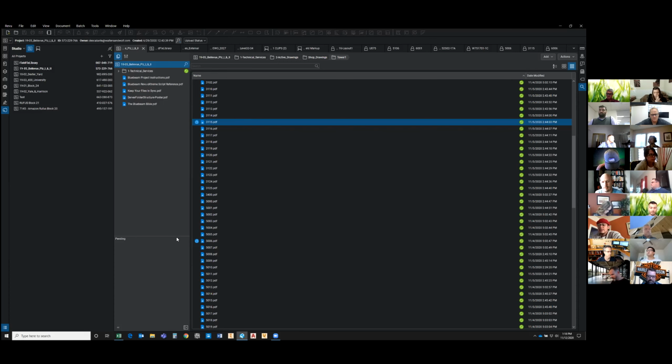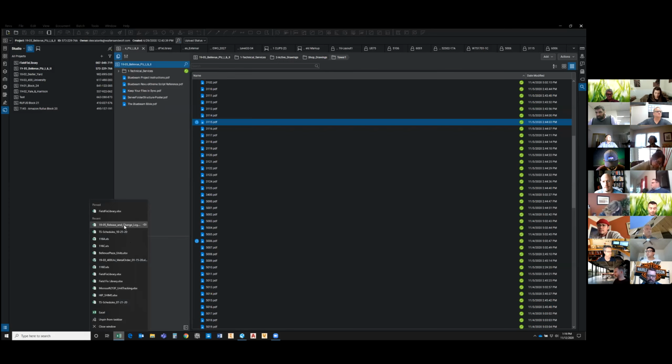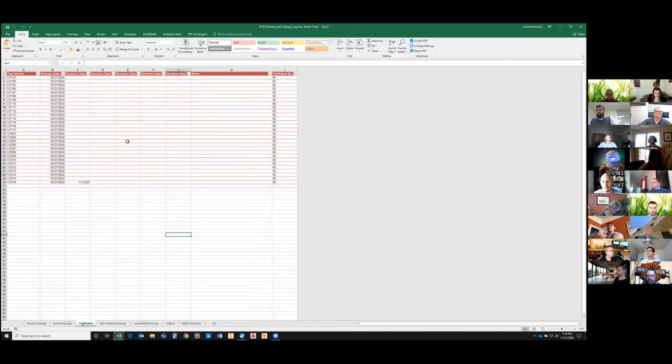Yes, and then the way we handle it is they would send out an email for an engineering change to the project team, whoever needed to be included on that, depending on what the project is and what the status was. And we have a log for that. We're in kind of the early stages, so it's changed a couple of times based on different people's input.